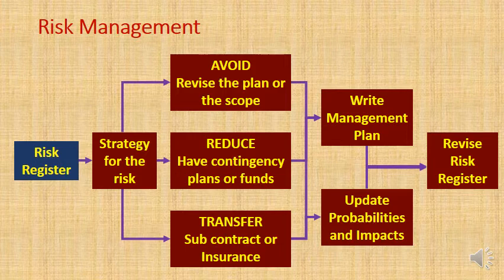Well, we could revise the plan or scope. We could potentially use a concrete that doesn't have a risk. So we use pozzolan concrete, let's say. Or potentially we can revise the plan, so we're going to cure the concrete for a much longer period of time, so that will reduce the risk of shrinkage, or avoid the risk of shrinkage.